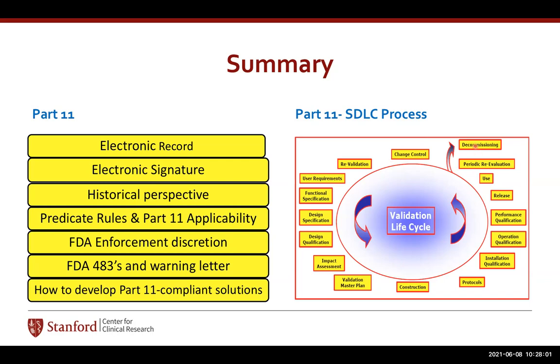What I did not discuss is the decommissioning. A device has a certain life, or a system has a certain life period. And a time comes when you think, I just want to retire that. There are FDA regulations about that also, which is called decommissioning. So you have to really retire or decommission a system, but then you have to document that properly because it was used in the past, perhaps even keep that device for some time.